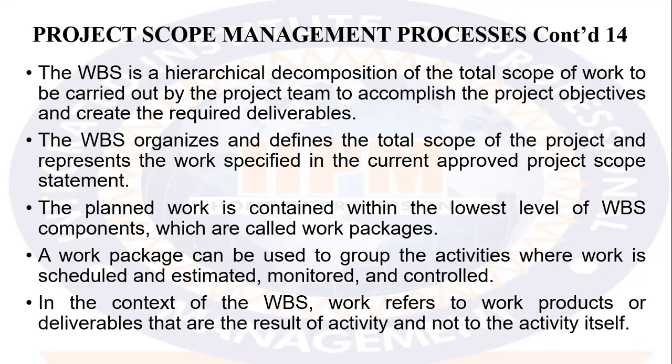So we talk about clearing of the ground, mapping, excavation, laying of blocks, and then the casting to have the foundation. Those are the work packages. It is these work packages that will give us the work product, which in the context of WBS we refer to just as work. The activities that need to be done to give us the foundation, we refer to them as work packages. Meanwhile, in the context of WBS, foundation is just seen as work. So when we say foundation, WBS calls it work, but what it means is the product that those work packages, when done, will give you.